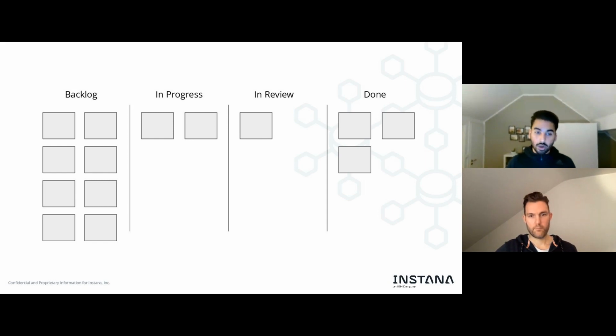So you maybe could say, all right, we only want 2 things to be there in total, right? So you can always have 4 in progress and 2 in review, but then at one point you realize, all right, cool, I have too much in review. I actually need to review those items, right? Maybe QA them, whatever, and actually make sure that those work items are being pushed to the next stage, which is in this case being done and being shipped, right?